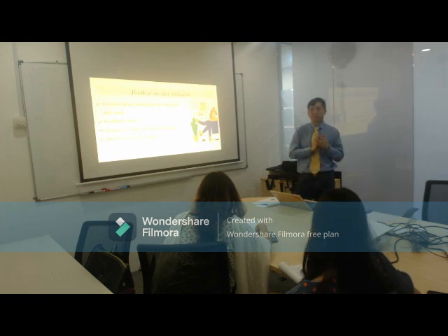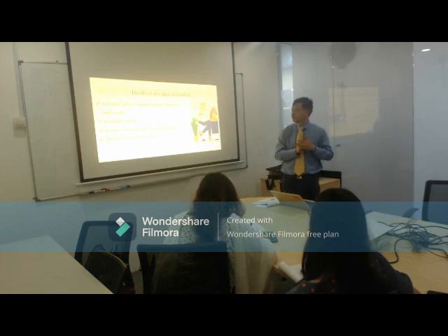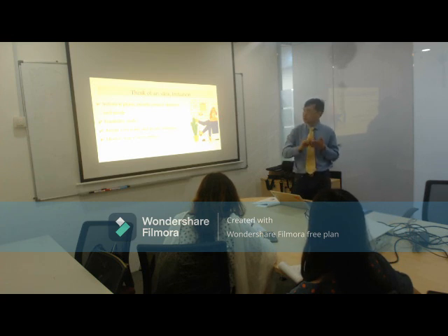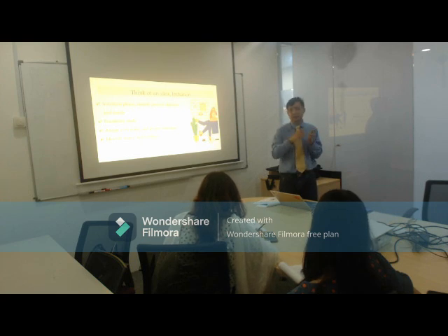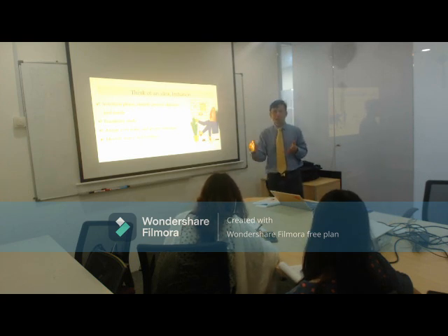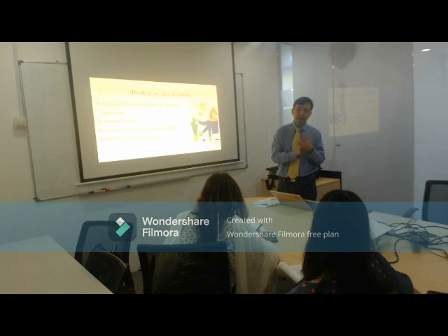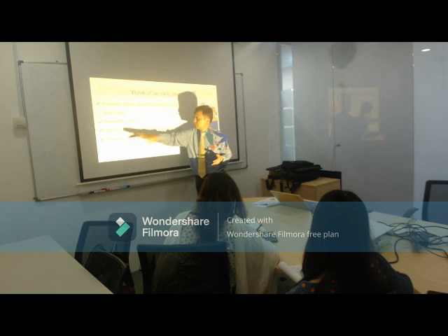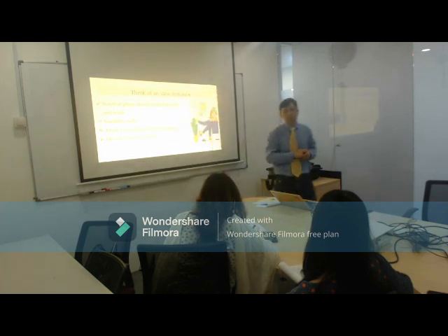Means they have decided on that, they record it in the meeting minutes, and somebody will create something called a PIN, Project Initiation Note. They will say who wants this, what the major deliverables are, who is going to be the project manager, who the core team is. They will mention all that inside the PIN, because that's the official document, which they then send to the management. The management is the one that will sign to say, yes, we start. And yes, they agree that he will be the project manager, and he will be the core team. So that's how they start the project.